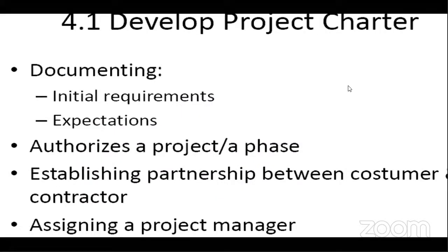So we have 7 management processes in project integration management. The first one is developing the project charter. The development of the project charter is a one-off event in the entire project lifecycle. So it's not something you repeat all the time.